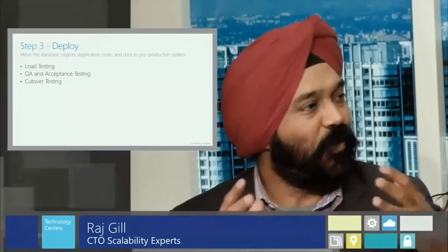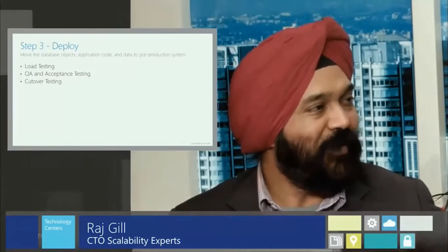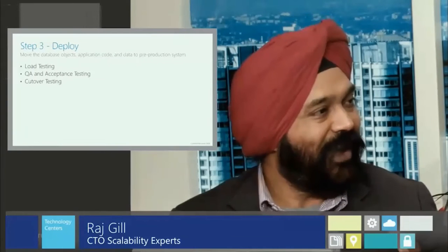Also, you want to plan out your cutover testing, because obviously you don't want any surprises, but when you do cutover, you want to make sure that you have your final set of tests you want to do. I'll give an example. We had one customer that was running all of the proper tests, but they had this once-in-a-quarter batch job that nobody really thought about, and that job runs literally overnight.